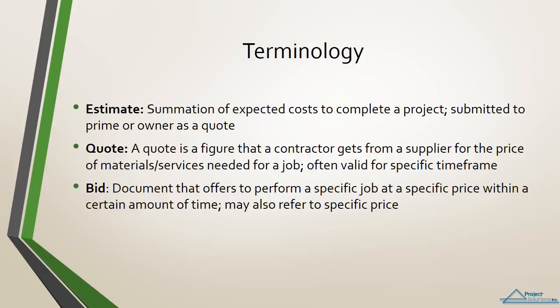A quote is a figure that a contractor gets from a supplier for the price of materials. Another example may be excavation services. Quotes are often good for a certain length of time. Costs may vary depending on the price of diesel. Outside the given time frame, the price of materials may change. A quote in construction may refer to a document that offers to perform a specific job at a specific price within a certain period of time. A good example of this is lumber. It may also refer to the fact that suppliers are not able to just create more 2x4s if demand exceeds their expectations.